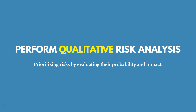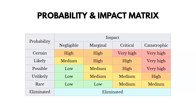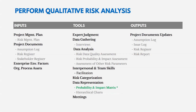Now we perform qualitative analysis — prioritizing risks by evaluating their probability and impact. The key inputs are the risk register and the risk management plan. One key tool is the probability and impact matrix, which documents what certain probability and impact scores represent. Probability is how likely a risk is to happen; impact is how bad it will be. Other techniques include interviews, expert judgment, facilitating meetings, and putting risks into categories. The key output is an update to your risk register.